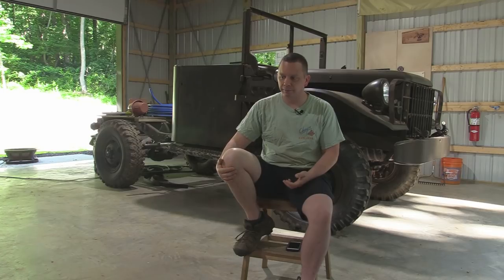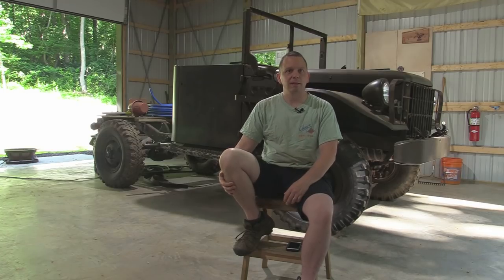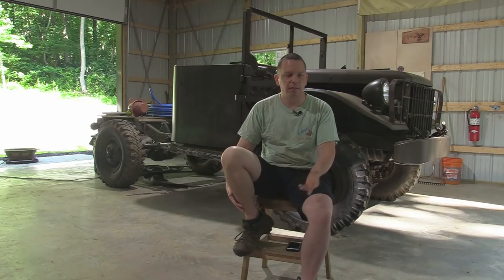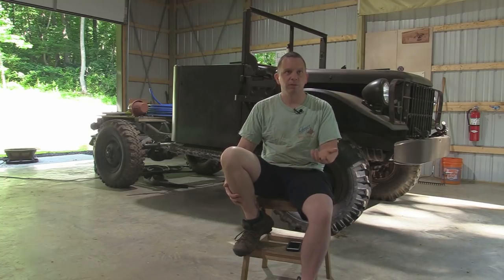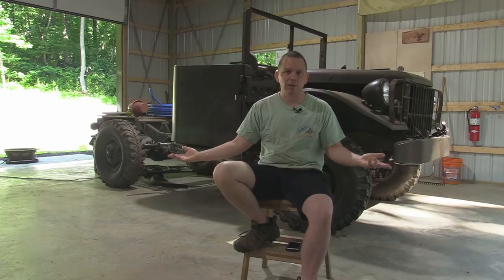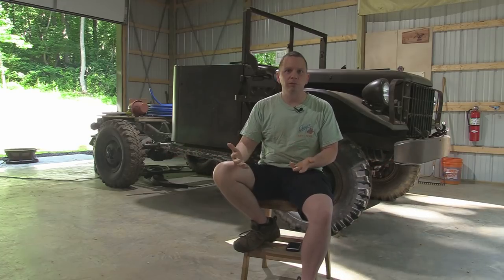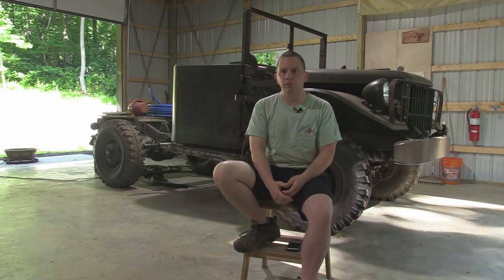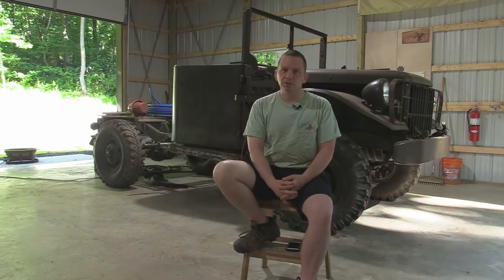Same thing with that leveling crap. I waited 10 weeks. The guy comes out, says we're good to go. I wait 10 weeks only for them to tell me that we're at a level. If I had a little bit more information, I would have been handling that the entire time so that when the day they showed up, we would have just built the building. But I suppose that's life.